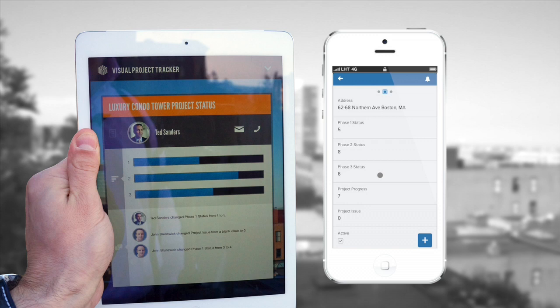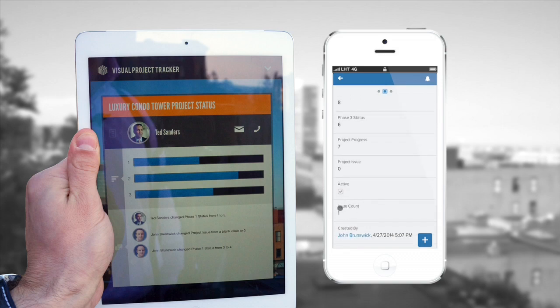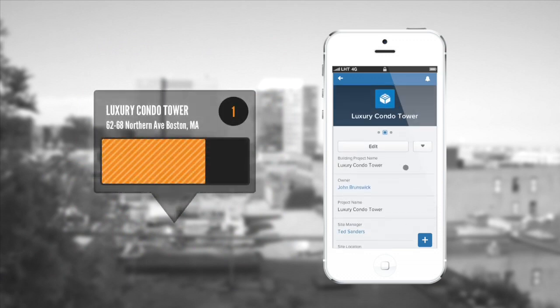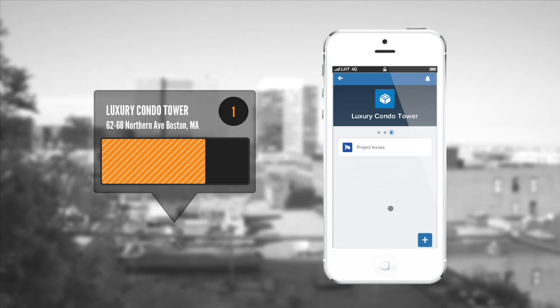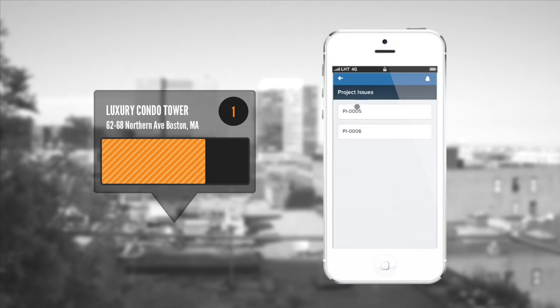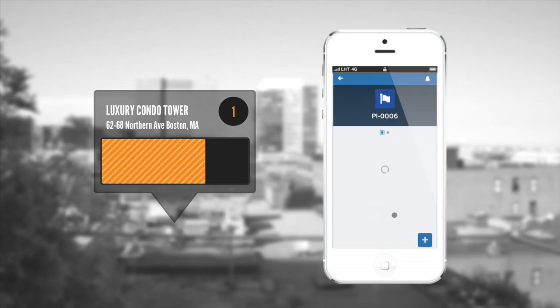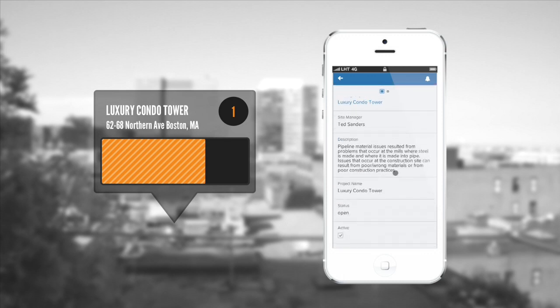These are formula fields that are aggregating the information of different sub-phases for a given project. So we're seeing summary information here that ultimately gets summarized into something called project progress — and that's how we were able to show graphically in those indicators on the map and in the augmented reality view how far along a project was. We can also see here that currently there is one issue related to the project. That issue count is actually calculated based on a related object called project issues. Let's go ahead and click into that — we can see here there are two issues. Let's go into issue six.